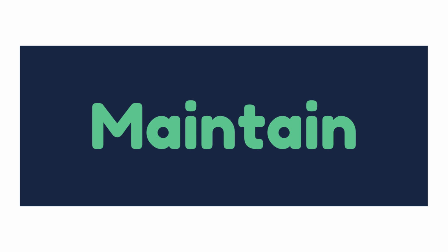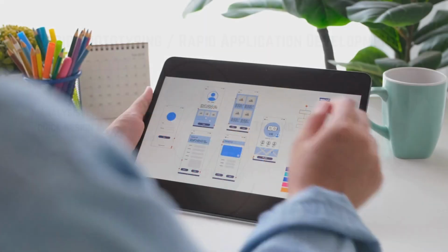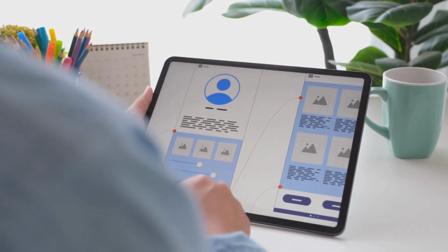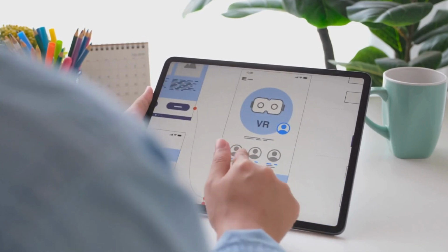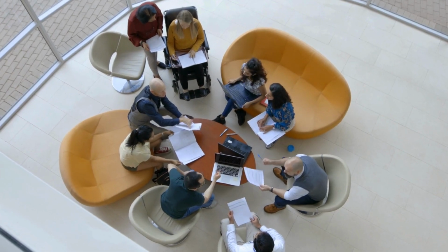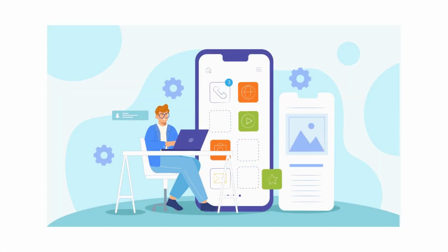The rapid prototyping or rapid application development (RAD) method provides a fast way to add functionality through prototyping and user testing. Technology updates can be difficult to comprehend in theory. This method allows early use of prototypes. It is easier for users to examine actual prototypes rather than just reviewing the documentation. In this method, a rapid requirements gathering phase uses workshops and focus groups to build a prototype application using real data. The prototype is then beta tested with users, and their feedback is used to improve the system.